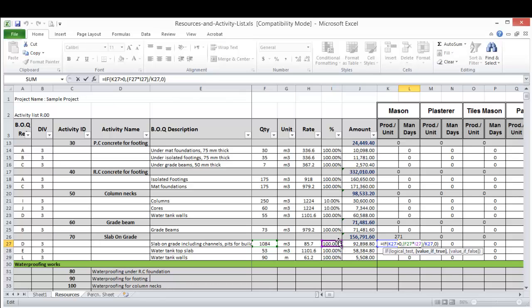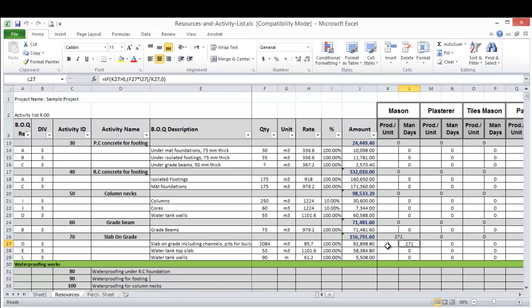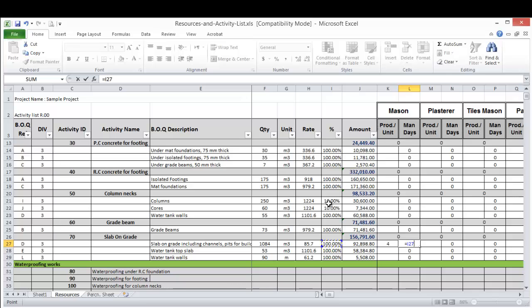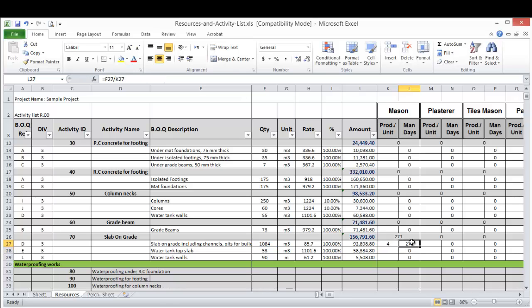This is what we talked about earlier. So this is a little bit complicated formula, let's make it simple. This equals this quantity divided by the productivity. This is the formula, very simple.